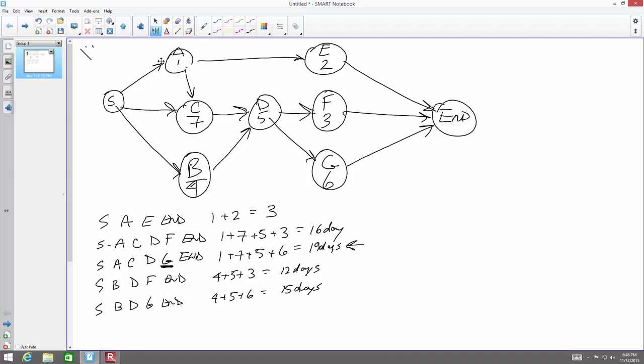The old classic system is considered design, bid, and build. That's what I grew up on. Engineer designs it, you bid it out, and the contractor builds it. The new thing that is becoming more and more popular is what they refer to as design build. You actually are the designer and the contractor on the same team, one team.